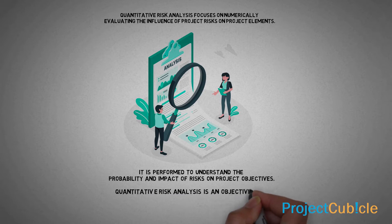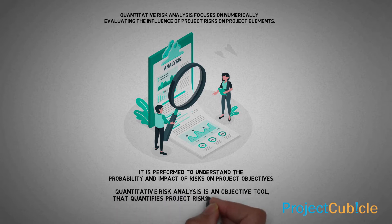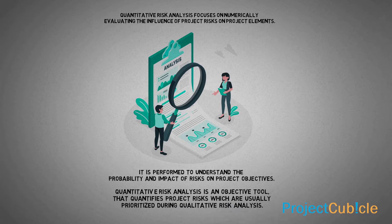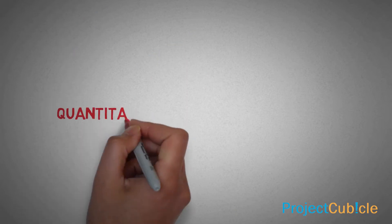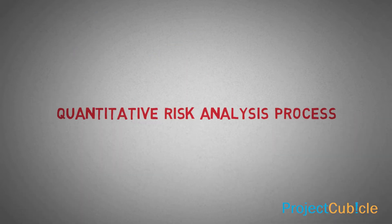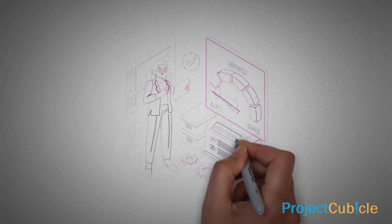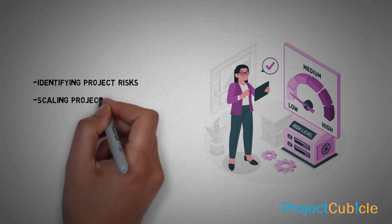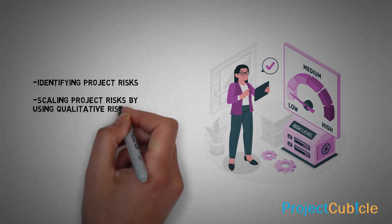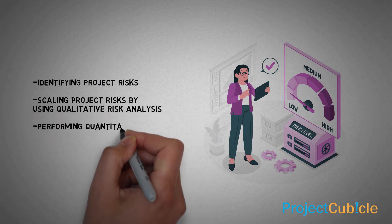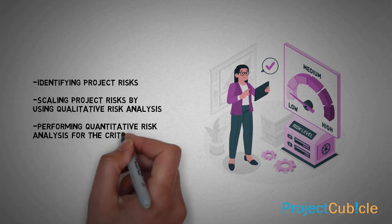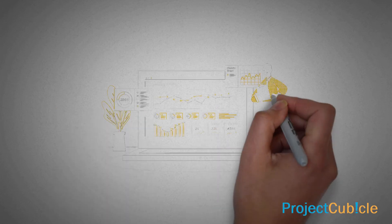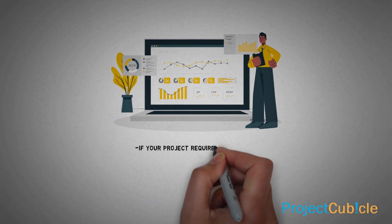Quantitative risk analysis is an objective tool that quantifies project risks, which are usually prioritized during qualitative risk analysis. The process often flows like this: identifying project risks, scaling project risks by using qualitative risk analysis, and then performing quantitative risk analysis for the critical risks.